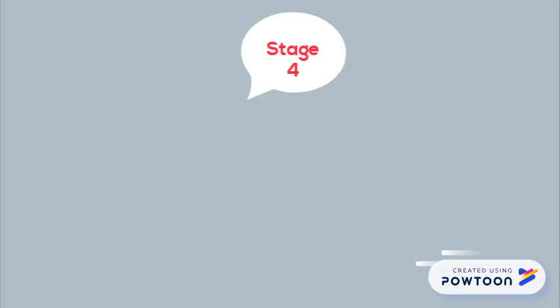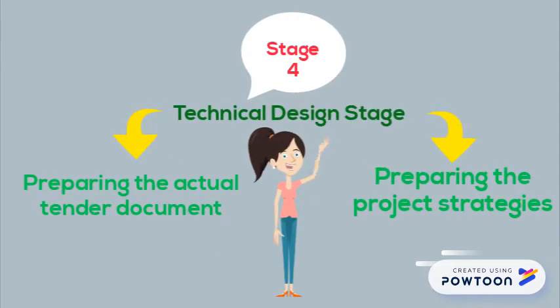At Stage 4, the technical design stage, where the final drawings are completed, the quantity surveyor is responsible to prepare the actual tender document and the project strategies.